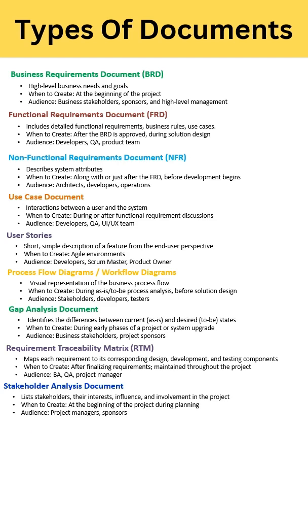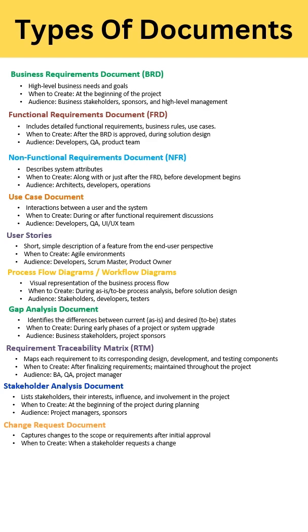RTM, that is Requirements Traceability Matrix. After finalizing all the requirements, you create RTM. Here you map each of your requirements with the corresponding design, development, and testing components. The audience for this document is BA, QA, and the Project Manager.